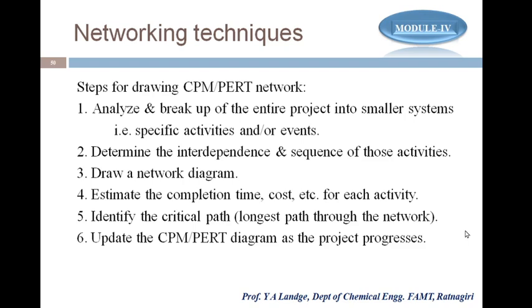And the sixth one, update the CPM and PERT diagram as the project progresses. Now this is not a permanent diagram, so once we execute the project, at that time we need to update the CPM and PERT diagram depending on whether the activity is completed within time or not.